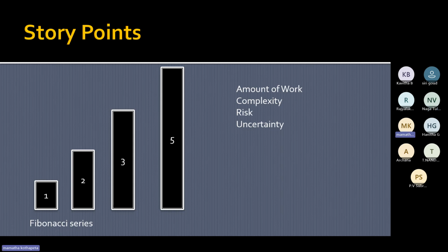Now, based on the highest number that we get for a particular requirement and the product owner's decision, the prioritization happens, maybe in descending order or ascending order, depending on the product owner's advice. Requirement 1 might get 10, requirement 2 might get 7, and so on. Based on the highest number, they might pick up that requirement for development. Or if the product owner says, no, let's go with the lowest number first, then we'll start the highest number later on.